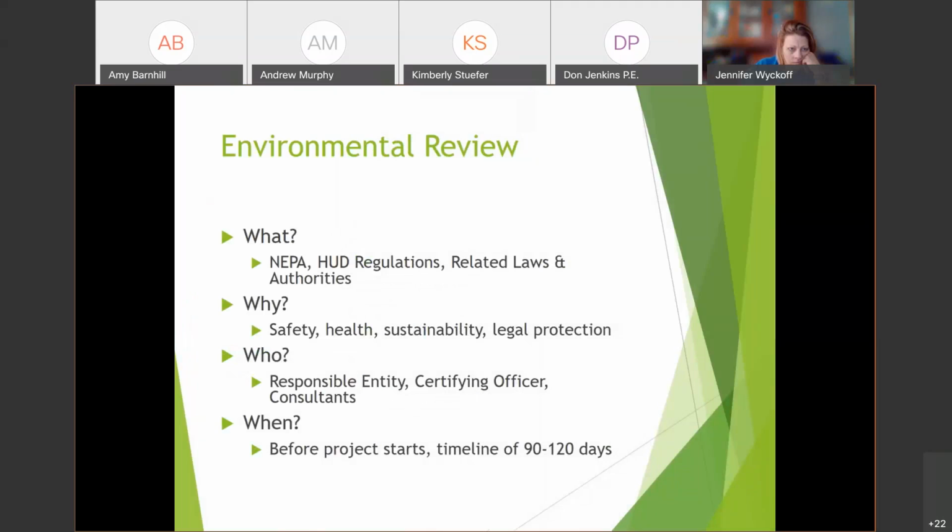Okay, so environmental review is, we do it because of NEPA, the National Environmental Policy Act, that was enacted in 1969. It's to ensure that federal agencies consider and address environmental impacts that result from activities and projects they sponsor. And so there are laws and requirements that you have to abide by. And HUD has developed its own set of regulations to implement NEPA and additional environmental statutes.